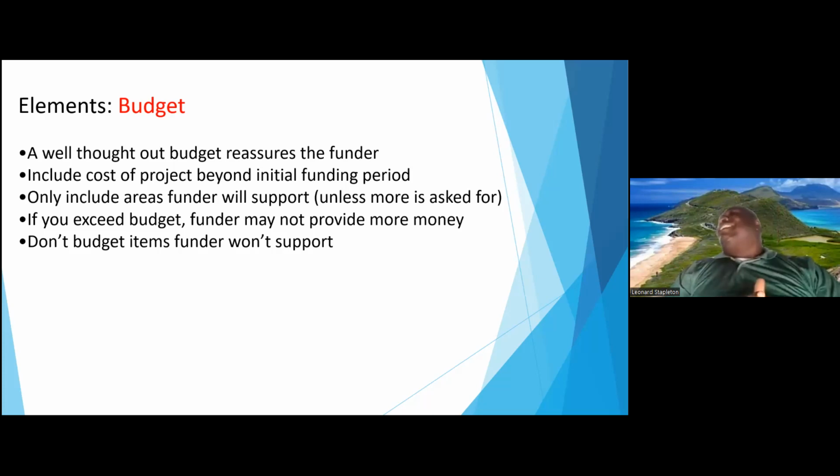Don't exceed the amount that we're asking for, but give us the value of your entire project. When your organization knows that your entire project has gone over the funding, it's that little part where you need to specify that we're not asking funder A for the full 60,000. We're only asking for the 10,000, the maximum they give. And this is where it fits within our overall project.